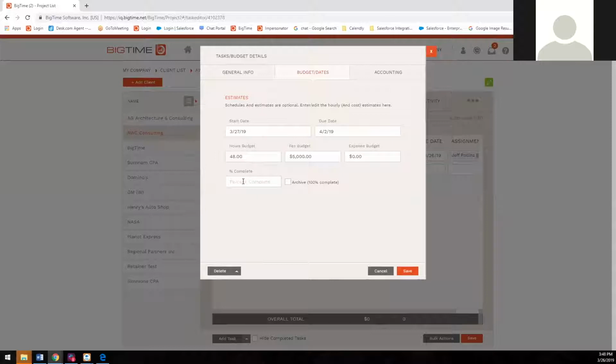Okay. Below that, we have our percent complete. Our percent complete will populate when we do any fixed fee billing for this task. So for my people up there doing progressive billing or percent complete, if you bill for a task for 50%, if you were to click into this portion after you create that invoice, that 50% will be populated in this portion.